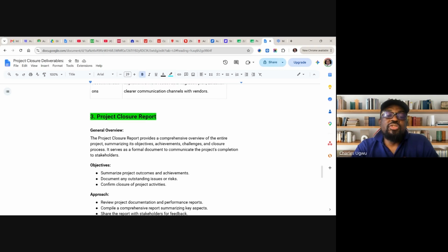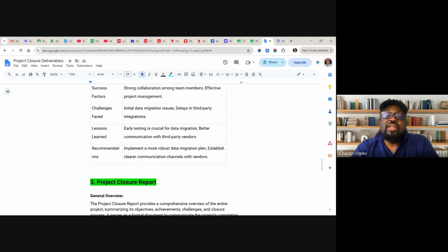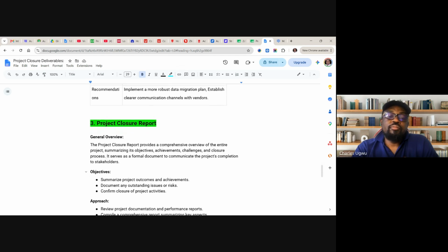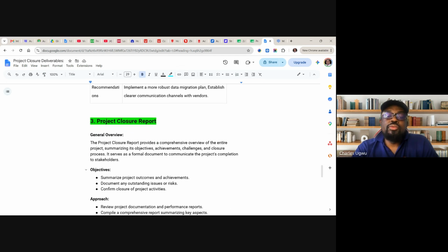Then project closure report. And this lesson learned, the project manager should lead the activity. You, the project manager, should facilitate this, but every team member should be part of it to discuss what went well and what didn't go well, and how you and your team could have done it better.